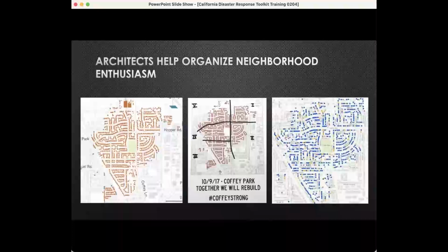This map was divided roughly according to the developers who built the neighborhoods, like I said, and those builders were encouraged to pursue rebuilding in those neighborhoods to the extent homeowners would like a similar house to what they had before. Those builders went to the original architects and engaged them to bring plans up to code. Homeowners still had a choice of working with architects to create more innovative designs since there was no design approval HOA process. So there is greater diversity in this neighborhood than before, but because of the community organizing, much more of the community got built back, and it was tracked every meeting.